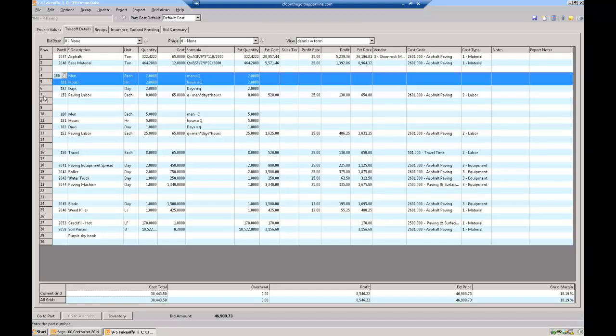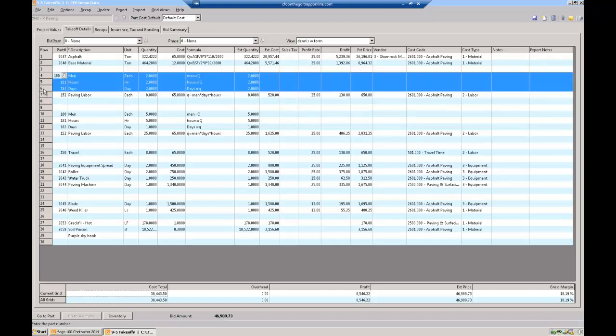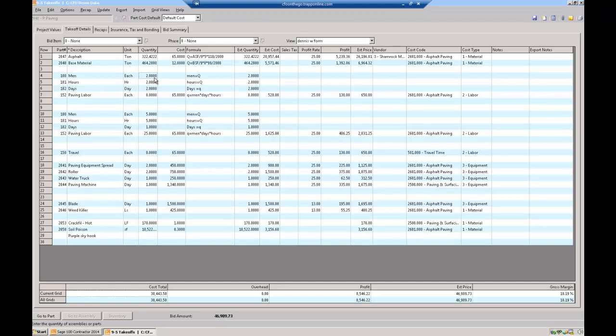So I was able to add this in. And at some point you hide these formulas. You don't want them seeing the formulas, but basically they just put in how many men they want. So let's say this is eight men or 8 women, don't care, and it's an 8-hour day, and they're going to be there for 1 day. I basically drop that in, I calculate that, and that gives me my 64 hours.